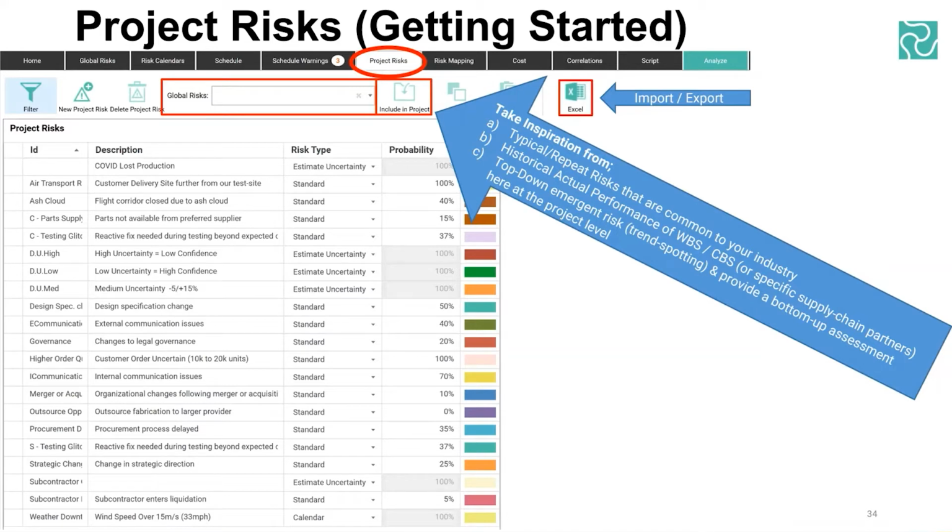So that helps facilitate good communication. But also, as I mentioned, if you've got repeat risks or generic risks, and you're in a work-winning situation, you don't have much time to start another risk register from scratch. Maybe you want to just bring over generic risks to your next project. This could be a great way of keeping and storing those. Also, with subcontractors and supply chain, if you've got lots of historical performance information, you could use this as a repository for keeping track of that.